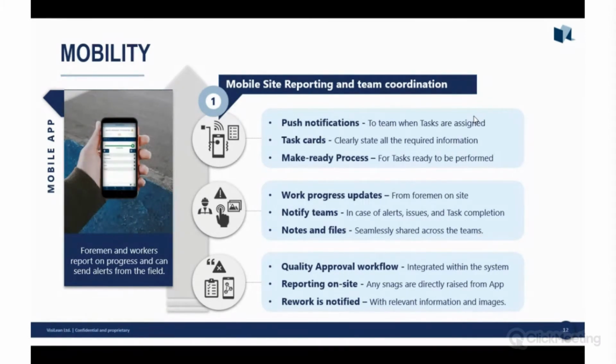Once the task has been made ready, you can start updating information of the task, updating the progress. You notify teams if there is something you need to alert them about, or if the task needs to stop for any reason, or if the task is complete. You can send photos and notes from the app to the software. So if I've put the task is stopped due to someone in my space, I can take the photo, I can tick the box that says space is the reason why this can't continue. That will collect that data.